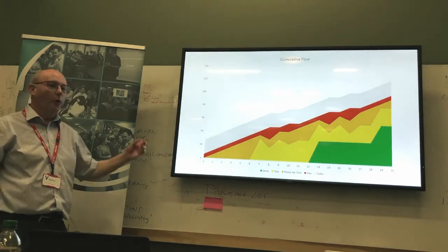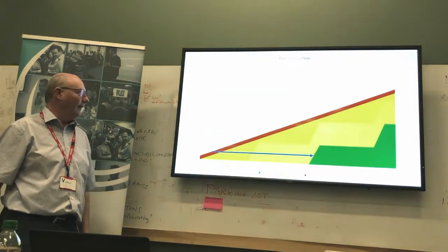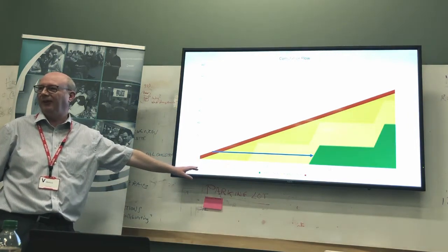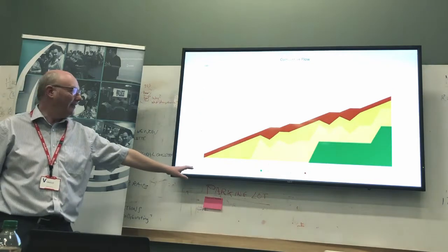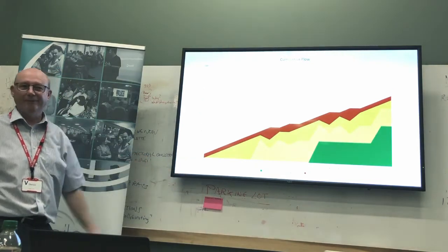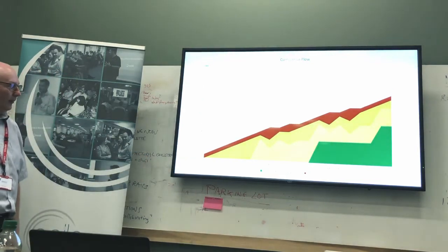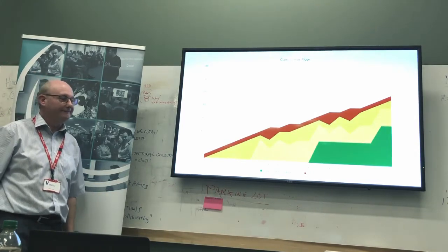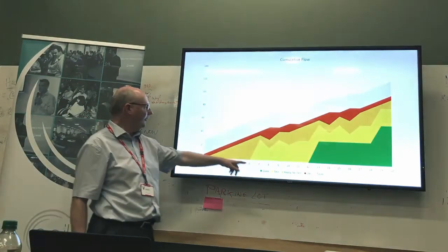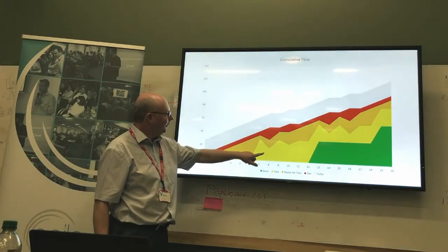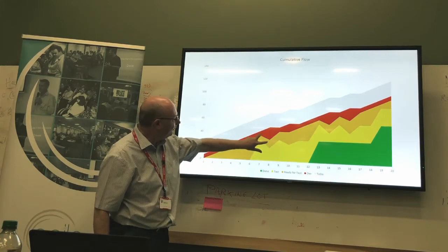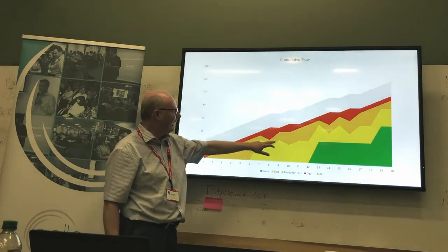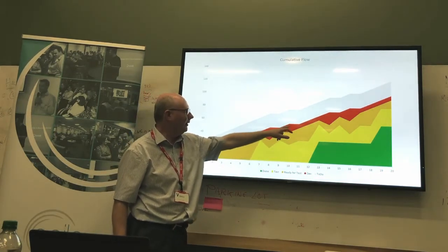Oh yeah, this is what really happens. That doesn't really happen. You don't give stuff to test and they test it for 2 weeks and it works perfectly. This is what really happens. So this is the separate test team with regression. Yeah? So you build all this stuff, they start testing it, they find a fault. So these stories here have actually been thrown up there. And then you hand them back, and then they find some more bugs, and it gets thrown up there.